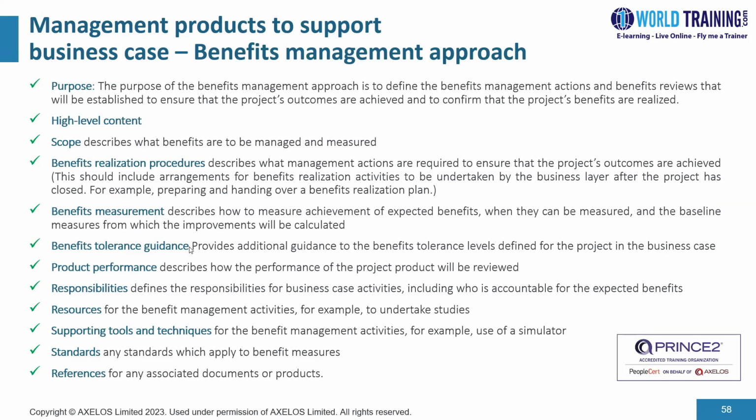Now, please do keep in mind that this particular document would have a life beyond the life of the project, because generally benefits do not necessarily completely accrue during the life cycle of the project. They might accrue several periods after the completion of our project.